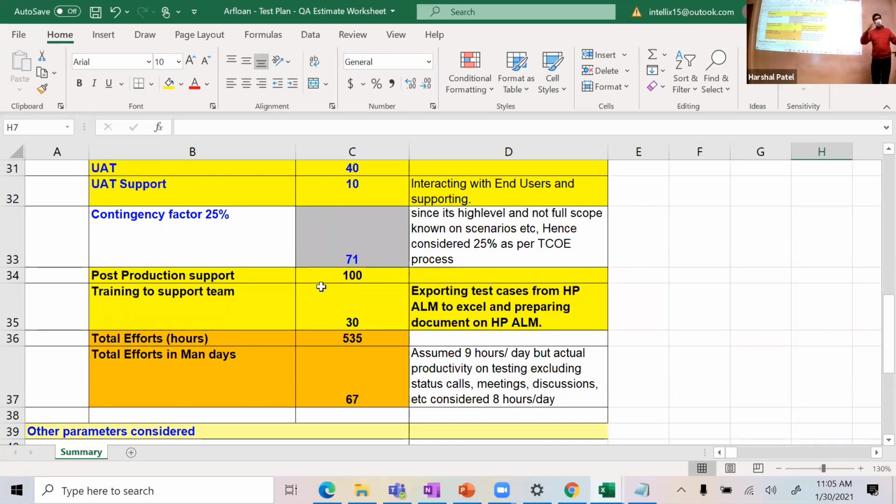And that's where you give the ballpark. Hey, it's going to take us about 14 weeks to test it. Now, with that 14 weeks, it may be in a waterfall way. Or they may say, okay, the development is going to have 7 sprints, and each sprint is going to be 2 weeks. Then I need to provide support for that much time, but during each sprint, I'm expecting this much time for testing. That's how you come up with an estimate. Because believe it or not, as soon as you go to work, the first thing they're going to do is drop a system requirements document and say, tell me how long it's going to take you to test. So you need to have some mindset of how you're going to come up with that estimate. Okay. Any questions on this one? Okay.